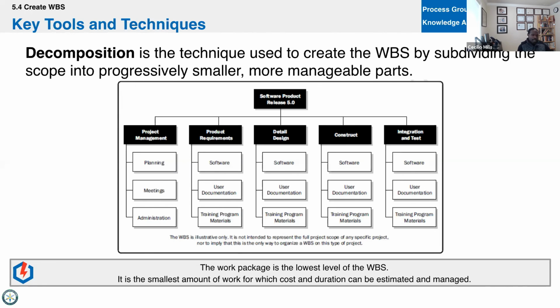And the other part of it ties into integrated change control. As you're continuing your plan, and let's say you get to risk and you start finding some risks, and you decide we're going to avoid these risks, we're going to accept these, and these ones we're going to mitigate. If you're mitigating, then you have to take some activity. Those activities now need to somehow come back to your WBS. So that's part of the 100% rule.